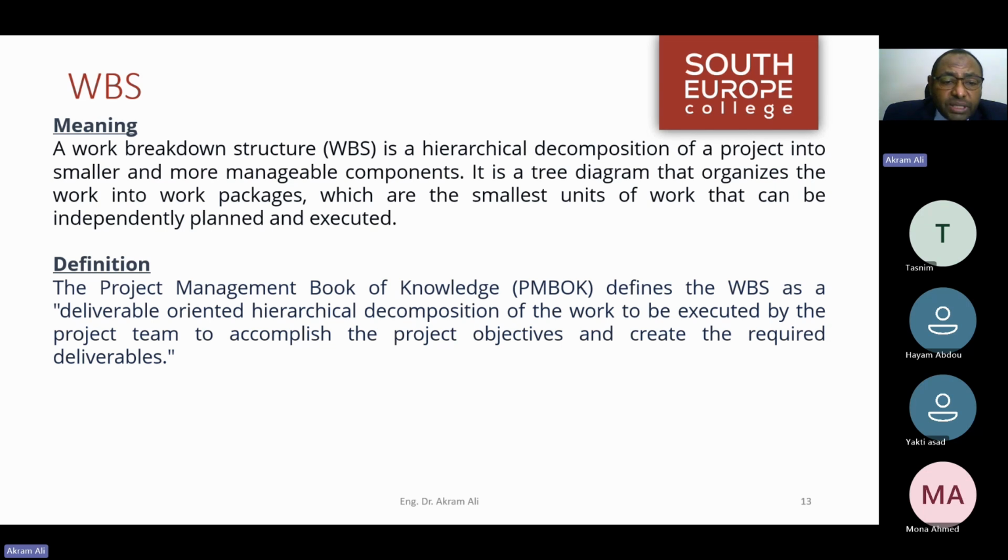So here, when we say independently planned, we actually refer to performing very important things on such units or tasks: risk management and estimation, duration estimation and cost estimation. So the more refined my work breakdown structure is, the more accurate my risk assessment and my estimation is.